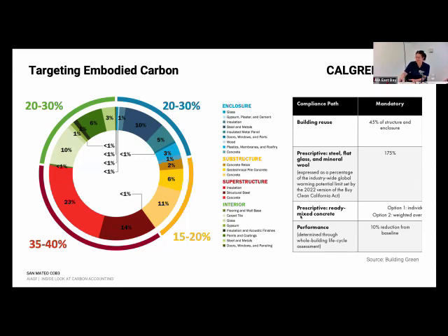But if you just throw in EAF as the baseline specification, with the expectation it's going to be free because you read it on EC3 and it looks good on paper, it might actually come at additional cost because our market on the West Coast is different from the market on the East Coast. And we're happy to engage on those conversations as general contractors, but we need to receive the intent of what the carbon reduction story is going to be. And then we'll connect you with our local bidding market and answer definitively in advance of even finalizing the DD set or the CD set.